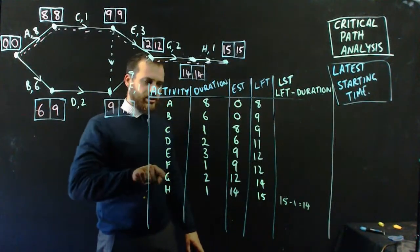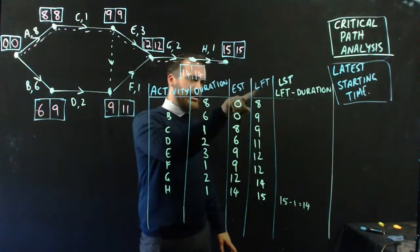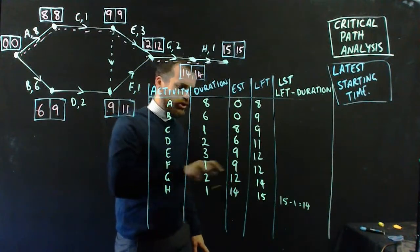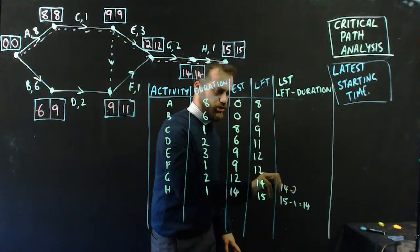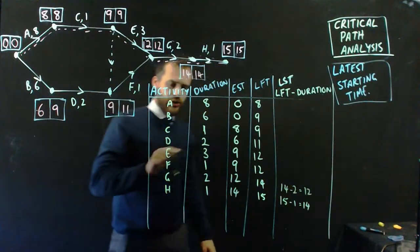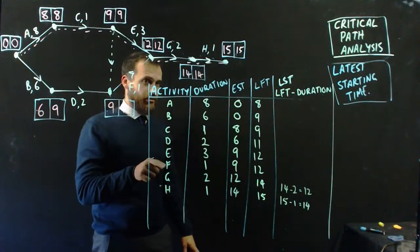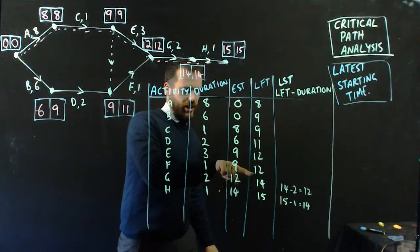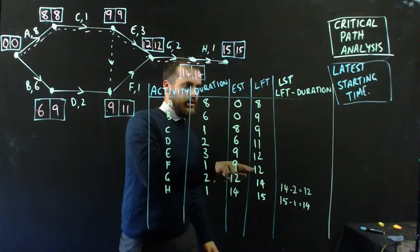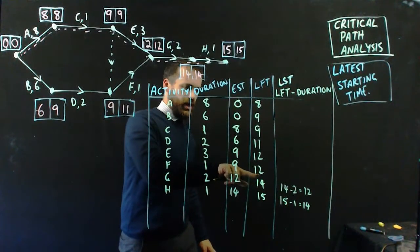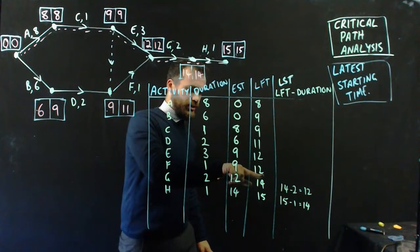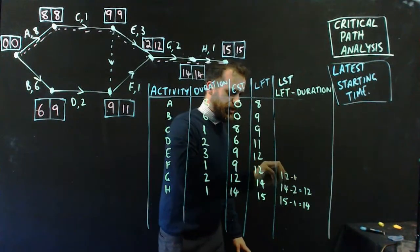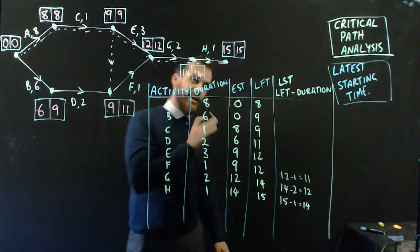The latest that G can start. So G's latest finishing time is 14. It's going to take 2 hours to do the job. So 14 minus 2 equals 12. G had better start at the 12 hour mark, or we're not going to get this done on time. Right, F. What about F? Let's see. The latest finishing time for F is 12 hours. It takes 1 hour to do F, so we'd better start it at 12 minus 1, which is at the 11 hour mark. And you can see that that's our little bit of slack time here, right? We said that could start a little bit later.